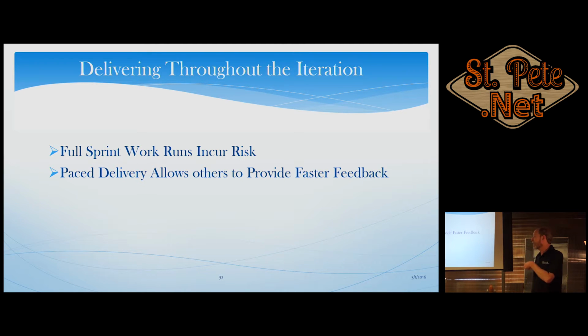Paced delivery allows others to provide faster feedback. So take those same 3 developers, same 3 user stories. Hey, let's all work together on a user story, and a 3-week sprint just to make my life easy. We're all going to work together on user story 1. First week, user story 1's delivered. Second week, we're all going to work on user story 2. And the second week, user story 2 is delivered.